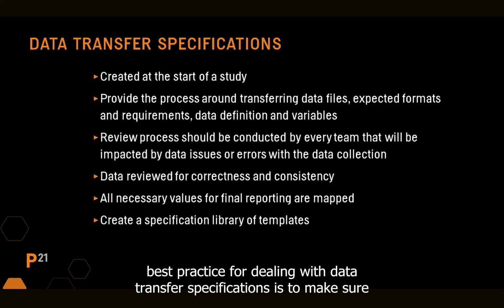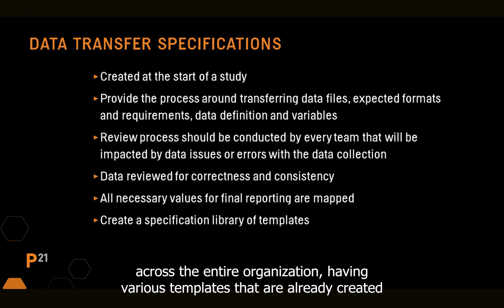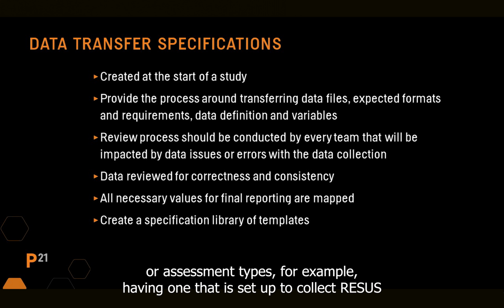Another best practice for dealing with data transfer specifications is to make sure that you have templates that can be reused, either a generic template across the entire organization, or various templates already created in subsets that are pre-populated based on the various therapeutic areas or assessment types.